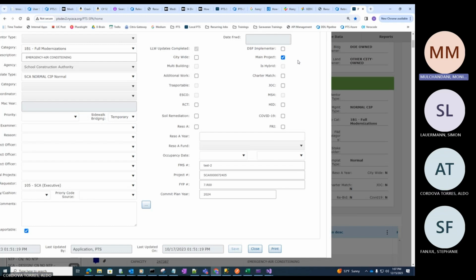So say there are 4 LLWs which have the same DSF number, and one of them is marked as the main project, and it was wrongly marked as the main project. So if we go and try to change it at LLW4, we want to make it the main project. Internally when you save, it marks the LLW4 as the main project, but it also goes to LLW1 and unchecks the main project, because only one project can be main project within the set of LLWs with the same DSF number. So this has this kind of a save or internal update to another LLW if it's updated.